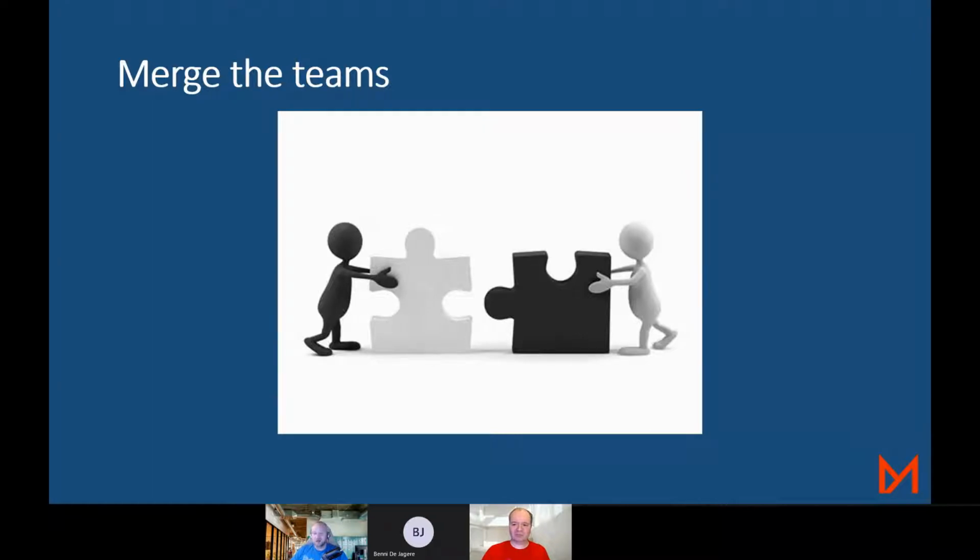In addition, our manager has decided that the development team lead will be the Scrum Master and the operations team lead will be the product owner. Now, for those of you who don't know, a product owner is responsible for translating business needs into workable backlog items for Scrum sprints, which means they must speak to stakeholders at various levels within the business.